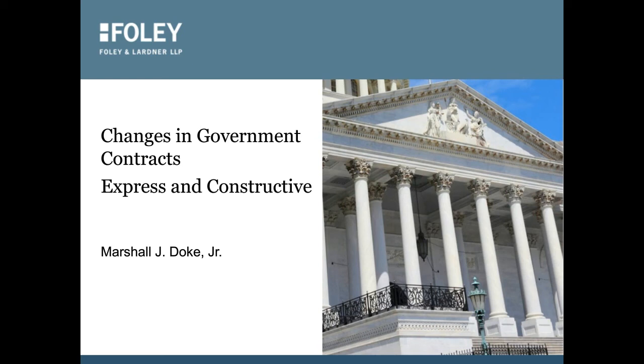Contract administration: the government's actions, or its failure to act, or its failure to act in a timely manner, may be unreasonable and result in a constructive change. There's one clear area that is not litigated often, but it's true that if the government delays in providing approvals of documents and plans and schedules, that can be a constructive change.